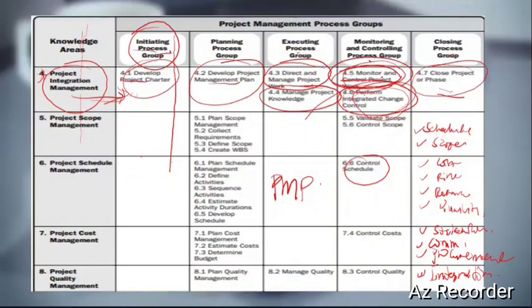Lessons learned, we prepare a small handing over report, we disband the team, we check whether the objectives were achieved. You review all these ones, you learn your lessons, and you close it properly. And you add your information, whatever you gather, the lessons, the documents we raise, we put them in our repositories, in our historical records to help us improve. Whenever we're doing something similar, we could fall on those lessons, those reports, those records to help us do a better job.